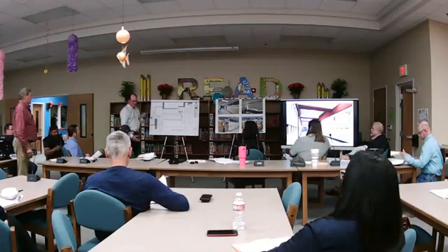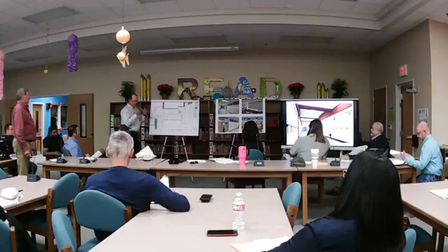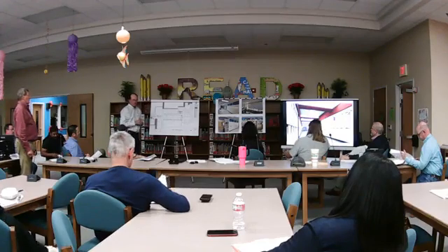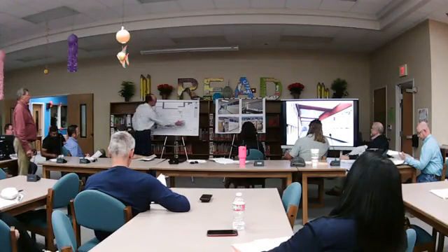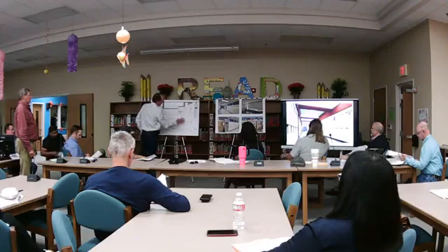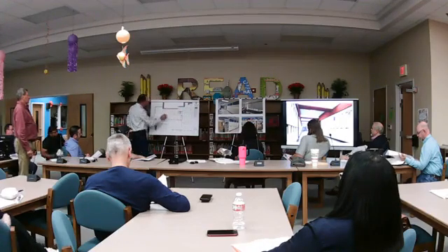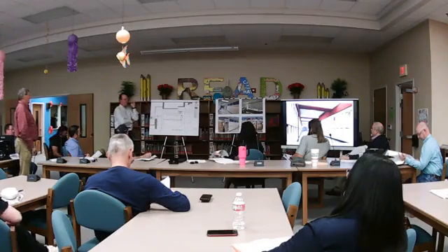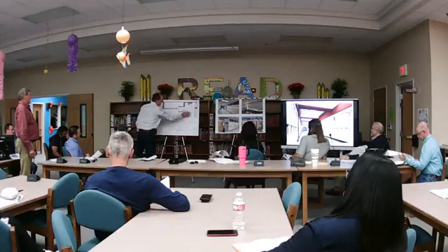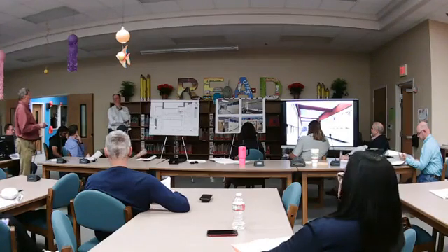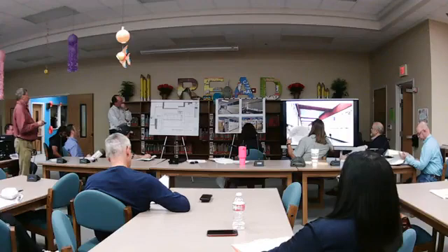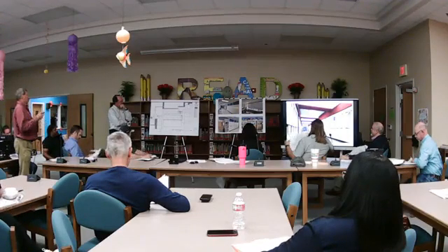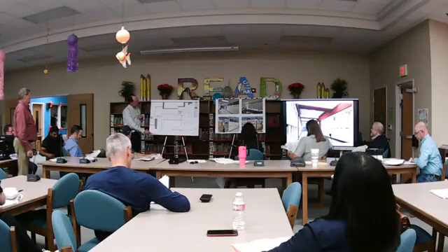When we price it out, we're going to be looking for prices for each area, so as we do the work, it gets billed accordingly to each area, and we'll really keep track of that well. But basically, the east side is G, and we move into H, and then I, and this is E. So we're planning to start on the east end. This heavy grade-in area represents some new concrete, to create a moat strip around the old gymnasium, but that's only concrete in there.